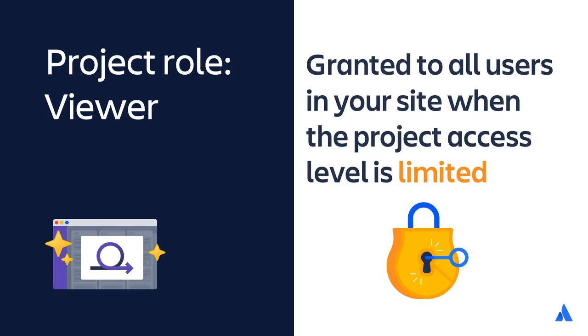It's important to understand the permissions granted to users with the viewer role. When projects are created and the project access is set to limited, all users who log into your site are granted the viewer role in the project.